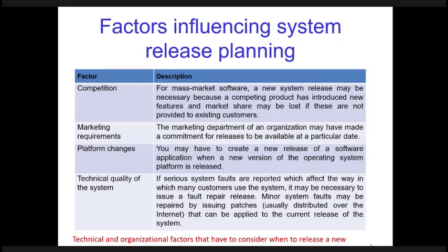So serious system faults reported, affecting daily operations of the business, so a fault repair release has to be made. And maybe for minor faults, you don't have to make a release. Minor faults are usually made available as patches, in technical terms, which can usually be distributed easily over the internet.